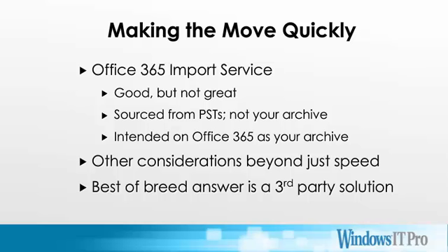And often what makes a project as quick as possible is knowing that when you move it, it's being moved correctly. It just works the first time you do it. If you have to keep on reprocessing mailboxes because there's been a problem with data not being picked up, or perhaps the user experience isn't what they expected, what causes projects to overrun is when things go wrong. So you want to be very confident that you only have to make one pass through your mailbox. You want to get it right first time.